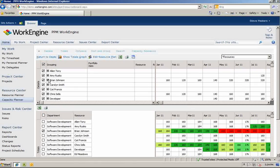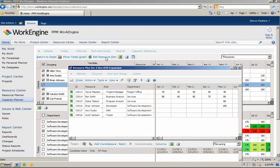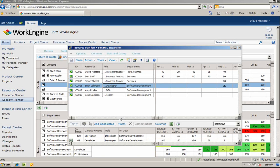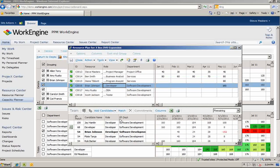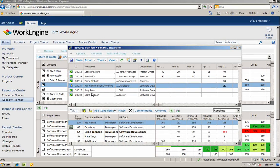Let's go back to the details grid and see if we can find someone else to help share Brian's workload. First, we can switch the top view to group by resource. Now we can see which project is causing Brian's over allocation and we can make changes to his workload directly in the view by clicking on edit resource plan. Now you can see that we are in the resource plan for the Xbox DVD expansion project. Let's select Brian and then click on match to find the best possible replacement. Here we can see that Jay Hamlin is a 100% match and is probably the better resource, having the developer skills needed and the availability to work on the Xbox DVD expansion project. You can then select Jay and replace him with Brian.